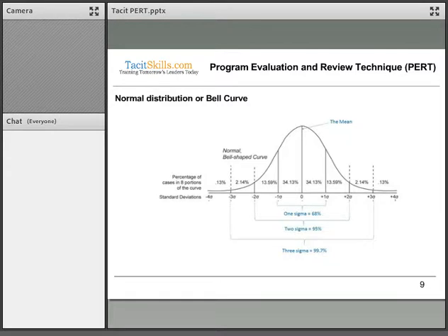If we look at this statistical information and calculate our sigma, or our standard deviation, which we'll see in a moment how to do, we'll find that statistically it can be proven that 68% of the population lies between -1 sigma and +1 sigma. That's what we call our 1 sigma range.